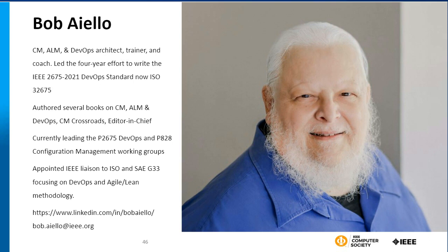Within the first hour, the guy picks up the phone, calls the head of development, and says, what I have asked for is not what I need. And I only started to realize it working with Bob, realizing what we had to do to test it. Folks, when they write requirements, they do their best to say what the system should do, but until you see a prototype, until you get a little further into it, it's often hard to really understand how the system is going to be used. So there's both requirements validation, but there's also fitness for use. In other words, can the system perform its intended function? That's the difference between really writing a system for requirements versus validating that it can really do the function that it has to do.